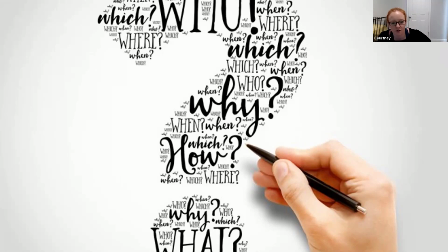Is the 6 hours per $1,000, is that just for voice? So, these are for fixed price projects. So it's not for IT projects where typically we bill by the hour because it's very hard to fix a price in an IT solution. And we typically don't do that. In these cases, it would be premise-based voice, large systems where you're installing all the handsets, you're getting everything in the wall, you're installing and configuring a PBX in their server room, and it's all housed on site.